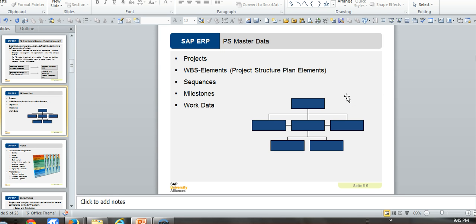So first you list all the major tasks, and within that you list the second level tasks. Let's say that you're building a machine. The first major task is the basic design of the machine. Then the second major task is to assemble the components, and the third major task is to make the machine operational. So these are the three major tasks, and within that there are subtasks. So a work breakdown structure is the first thing that you do to outline all the tasks. So that's what this is talking about.